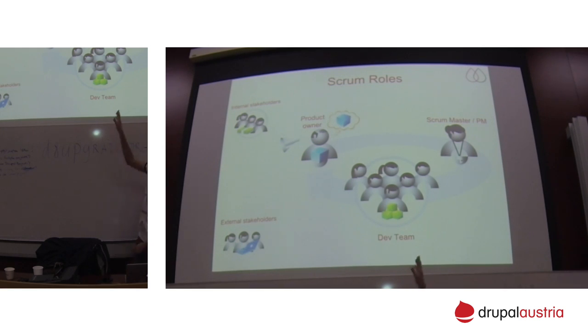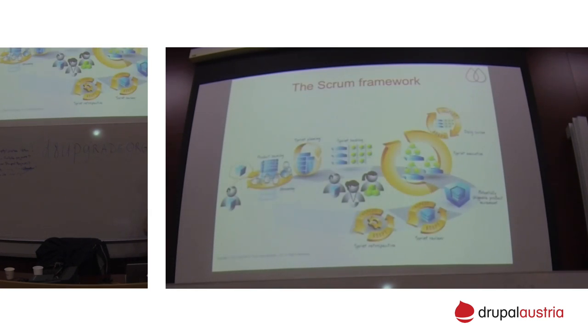So as you see, the product owner has the vision. He knows how the solution should look at the end. Very quickly, how it works. All the requirements are provided by the product owner, who knows everything about the solution, and they're captured in a product backlog. In the product backlog, they're listed and prioritized. The most important requirement goes at the very top.